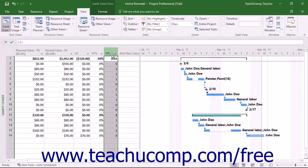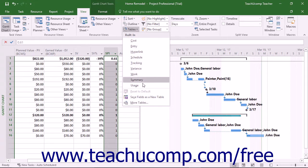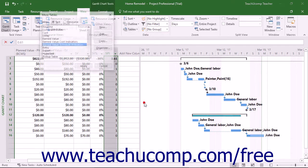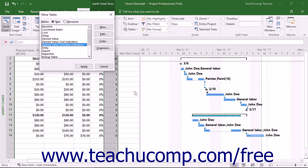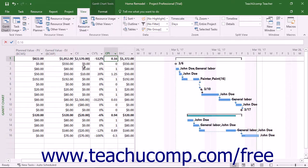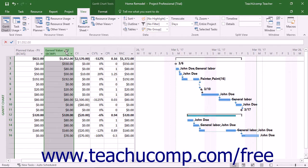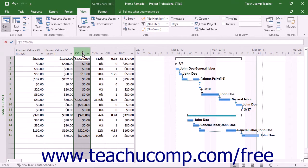The Schedule Performance Index is an index value that shows how many cents of actual worth was accomplished by the status date for every dollar you plan to spend. You can also see the Earned Value Cost Indicators for a project file in the Table view of the Gantt Chart. To switch to this view, click the Tables drop-down button in the Data button group on the View tab in the ribbon and choose the More Tables command from the drop-down menu. In the More Tables dialog box, select the Earned Value Cost Indicators choice and click the Apply button to show the values in the Gantt Chart view. As with the Earned Value Schedule Indicators, you will see the Planned Value and Earned Value columns. Also within this view, you will find the Cost Variance, which is the difference between the EV and the actual cost of work performed as of the status date.